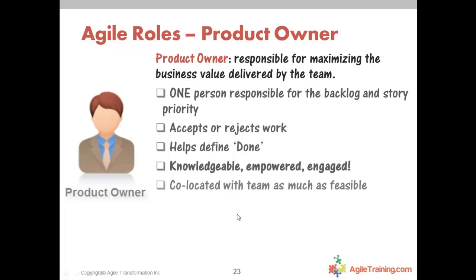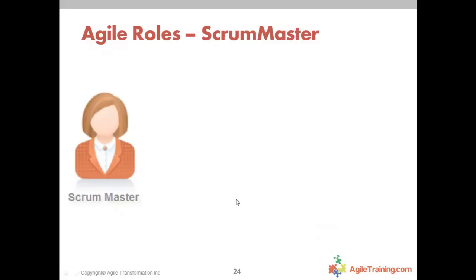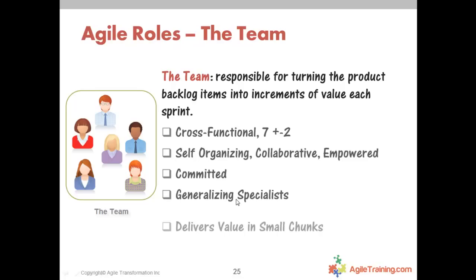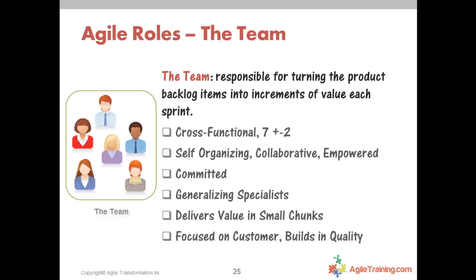When you download the slides you'll get more detail on each role. Teams shouldn't be large — seven plus or minus two is ideal. Once a team gets to 15 people, they'll create mini silos and won't perform as a high-performing team. We want teams of generalizing specialists — it's not about 'my task' or 'your task,' it's about getting the story to done.